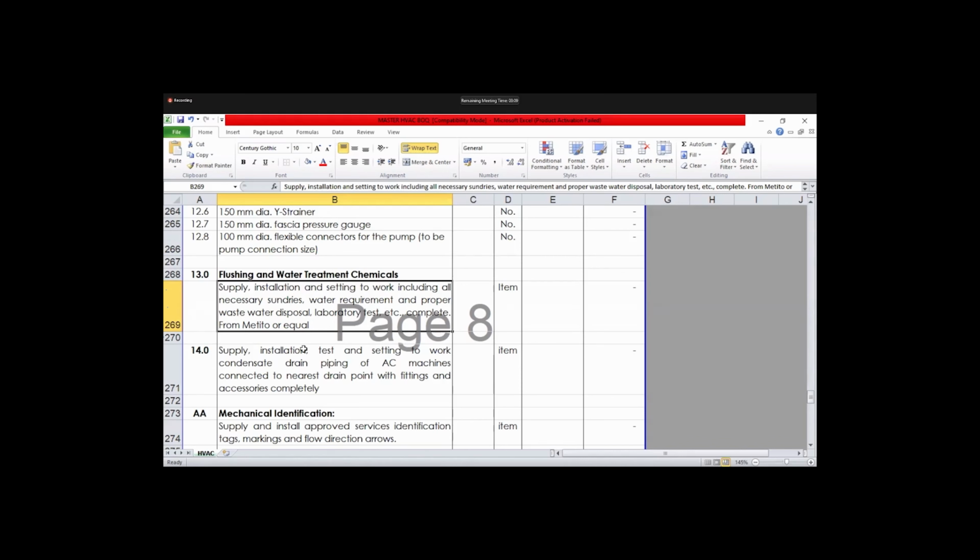So if the laboratory tests and gives us the report in 1 or 2 days, they will tell us whether the inside of the pipe is okay for the proper functioning of the chilled water or not. So if the water is clear, we can start with our testing and commissioning of the chillers, okay.